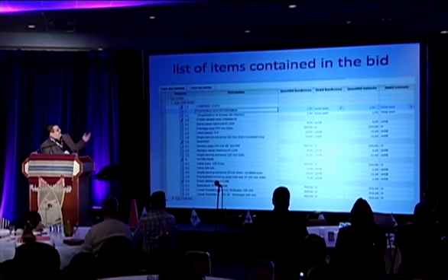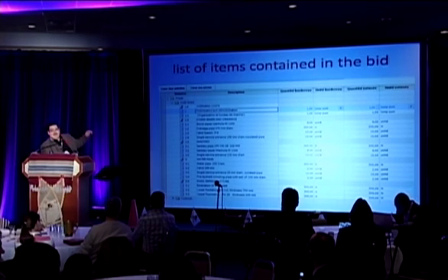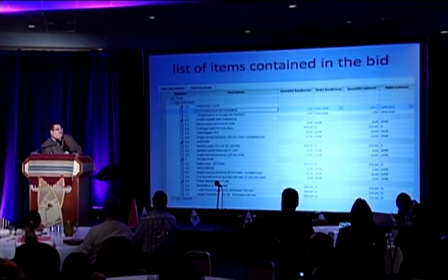And for all the items in a contract, most of the time you'll want to include your manpower in the activity. So if you have 200 meters of storm sewer to install, when you're preparing your bid, you have to calculate the manpower hours it's going to take, and there also your equipment.